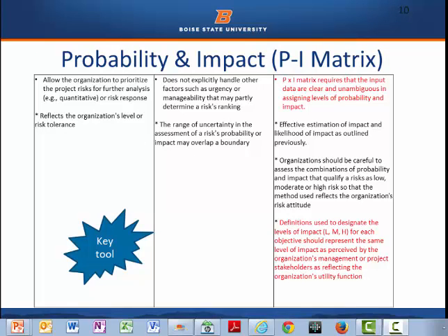This is the area that most people see in the area of qualitative risk analysis. It's the probability and impact matrix. The key to this is to define up front, before you start the project, the definitions of the matrix, the two sides of the matrix, the probability and the impact side. We see these already canned for us. The usual one is a 5 by 5. Well, that doesn't have to be that way. We can modify it for whatever you need on your project.